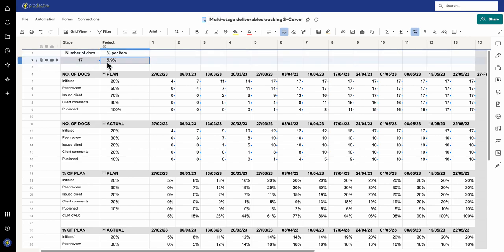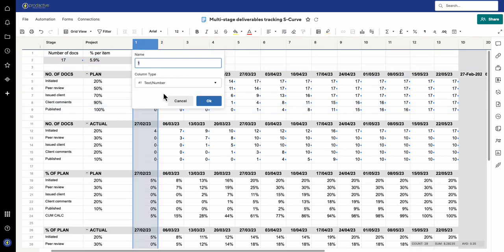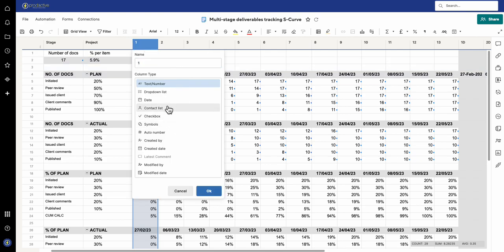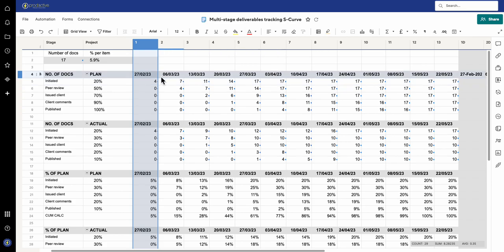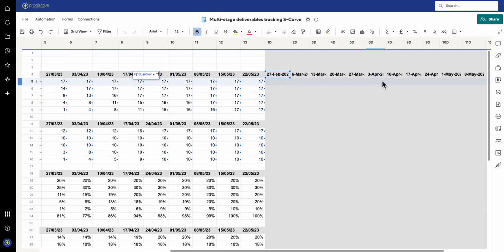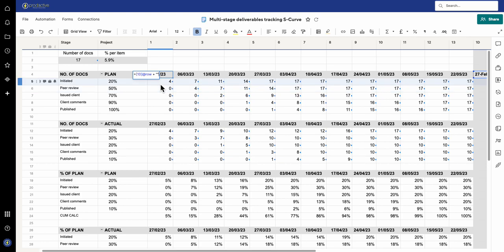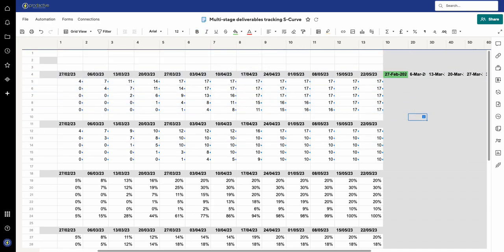It works out based on each document being worth 5.9%, because there are 17 documents — so that calculation is one divided by the total number of documents. That's how it works out the overall piece. Each document is worth that. The other critical piece is that the columns are text, because if these were date columns they're not going to work at all. If I turn this to a date, you'll see it says it's expecting a date and I've got numbers in there, and that's not a date. So if I undo that — what you have to do is make these text columns. In order for the date to appear, you pull in the date from elsewhere.